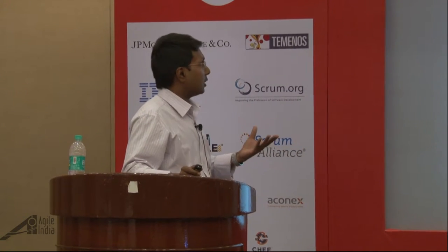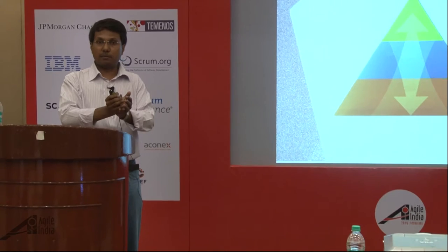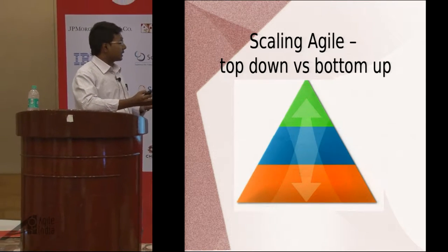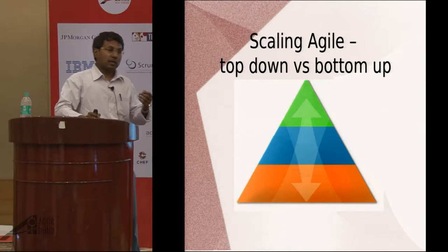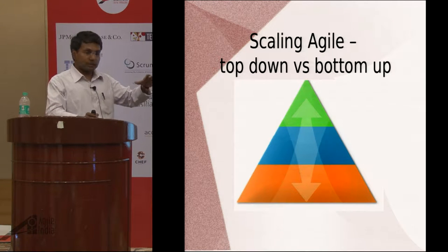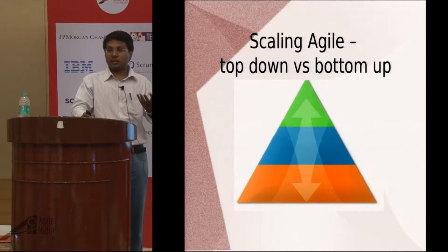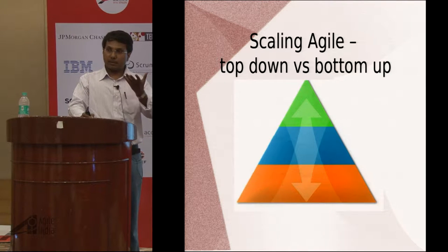In terms of scaling agile, you can either do a top-down approach or a bottom-up approach. If you are a small startup, you start with a small team and then expand, creating more teams — that's scaling agile bottom-up. Whereas if you are an existing company wanting to implement agile, you can do top-down with a directive from top management. In the case of the Spotify model, they started with a small team and then expanded.